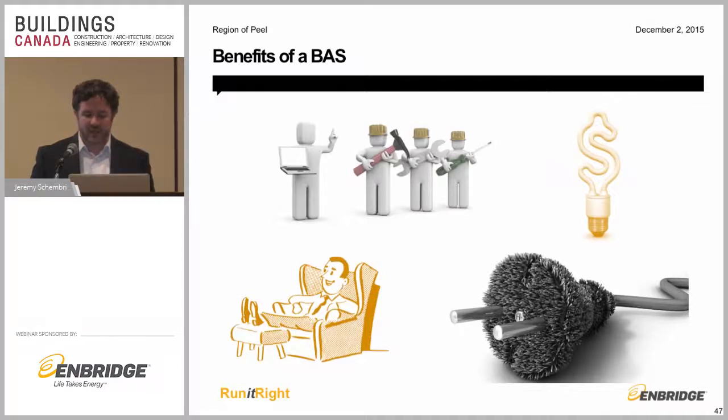And that's actually a key thing worth noting, especially when you're installing a BAS in more of a retrofit scenario. Oftentimes, staff will assume that the existing building's HVAC system was operating optimally, and everything going forward is now the BAS's fault because it's new, and for some reason they forgot that everything wasn't running perfectly in the past. So you get a lot of calls: oh, the BAS isn't working, people are complaining about it being cold, people are complaining about it being hot. Even in facilities that don't have such systems, you still have those complaints. That just builds on the importance, again, of making sure that the operators are trained, and that others in the facility are trained. The more people you can train on what this system is doing, the better it's going to be for everyone at the end of the day.